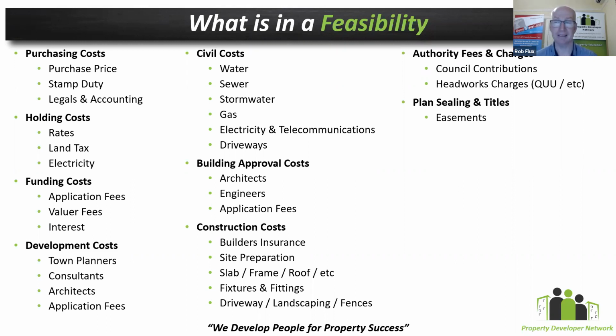Then you've got the plan sealing process. Plan sealing is the very last step that you do before you actually get your titles. So it is taking the constructed elements that you've done and proving to council that you actually met all of the development approval conditions that they placed on you way back at the development approval stage. And so you need to say, here is the condition, and here is proof that I've actually done that, and provide a level of evidence, and submit that to council.